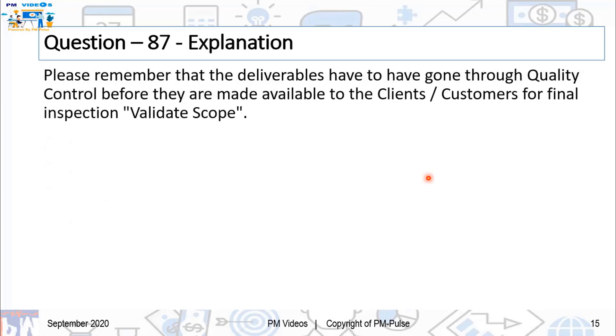Please remember that the deliverables have to have gone through quality control before they are made available to the clients or customers for final inspection. Validate scope. All right. So keep that in mind.